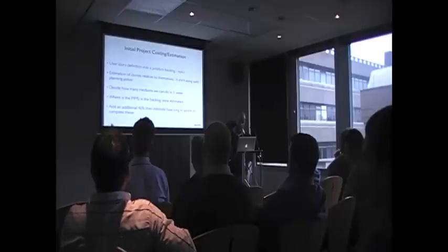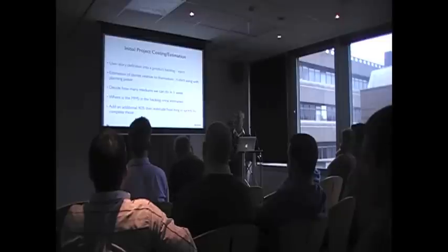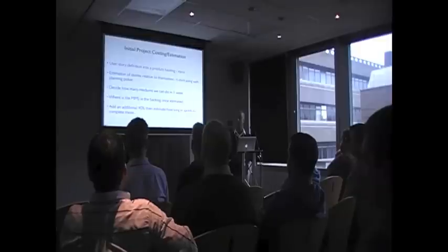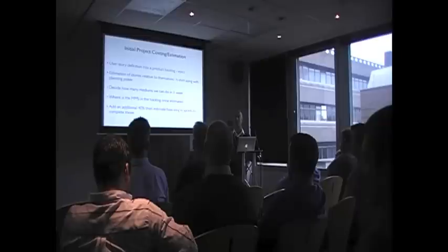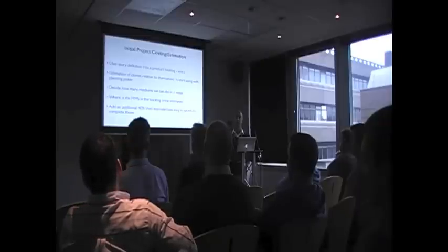So what we started to do in a project, when you get the initial proposal, is sit down with the team. Involving the team, and we have our own office, is very important because sharing knowledge is key. A developer may have done something already that another developer doesn't know about. So if I go away and sit in a corner and come up with a cost, 3 of our developers may have already done something that I don't know about. It could only take us 10 minutes to do as opposed to 3 weeks. So it's that sitting down at the beginning when costing a project, coming up with a list of user stories that we think would fit that project from the brief that we've been given.